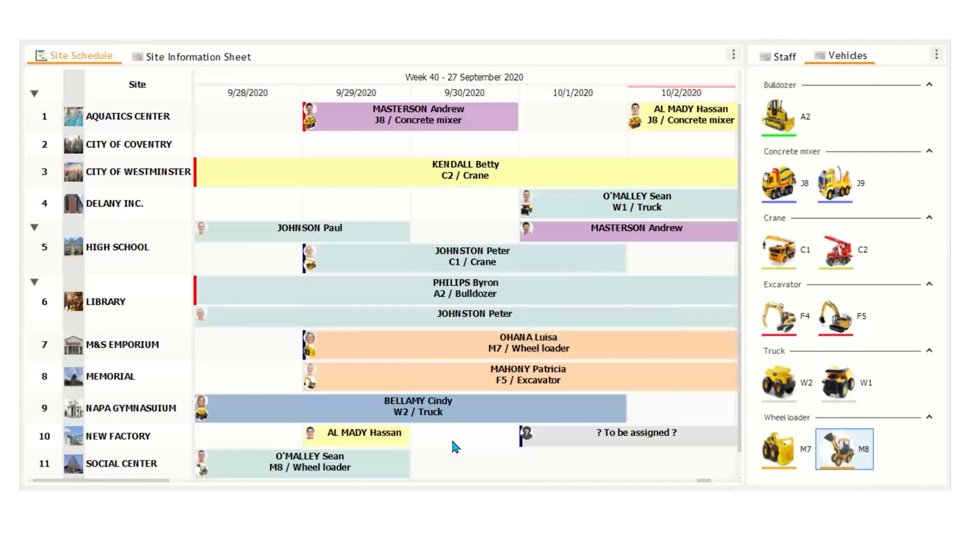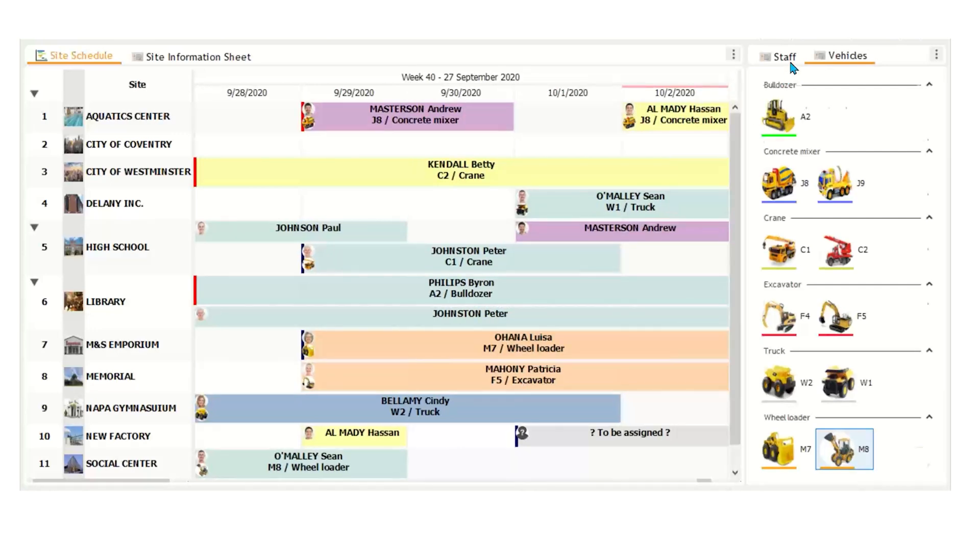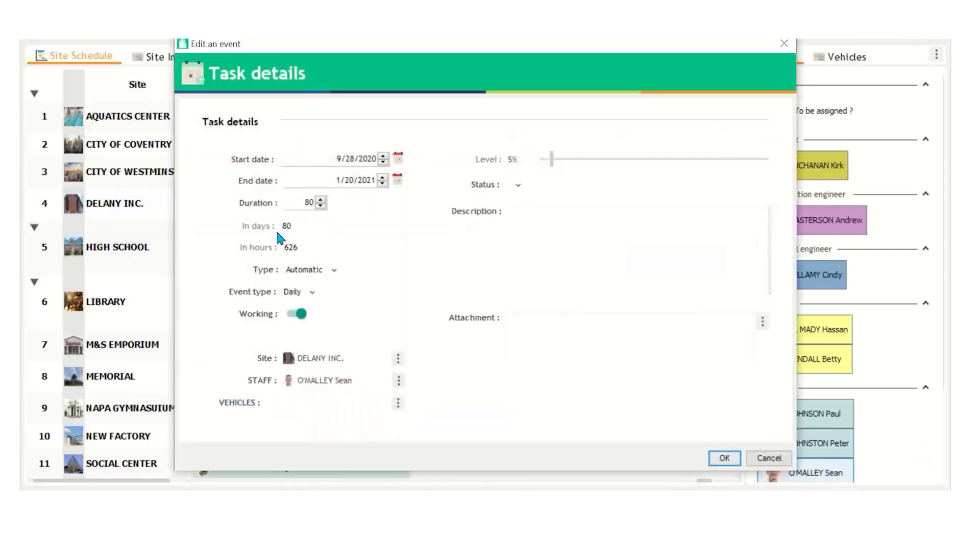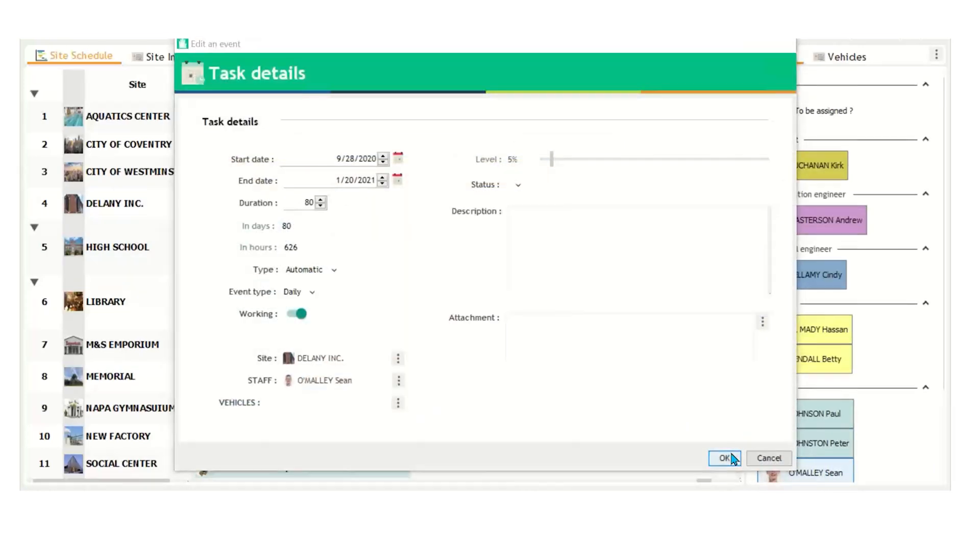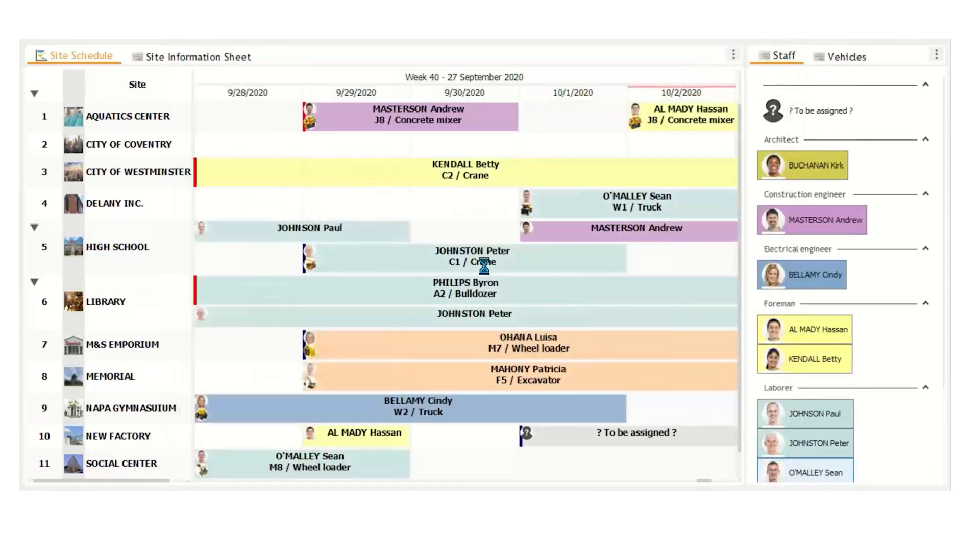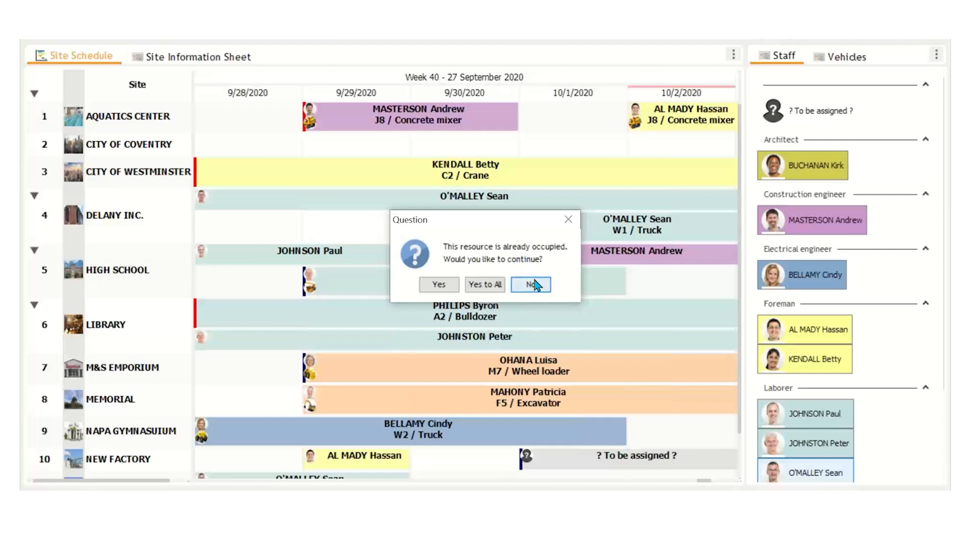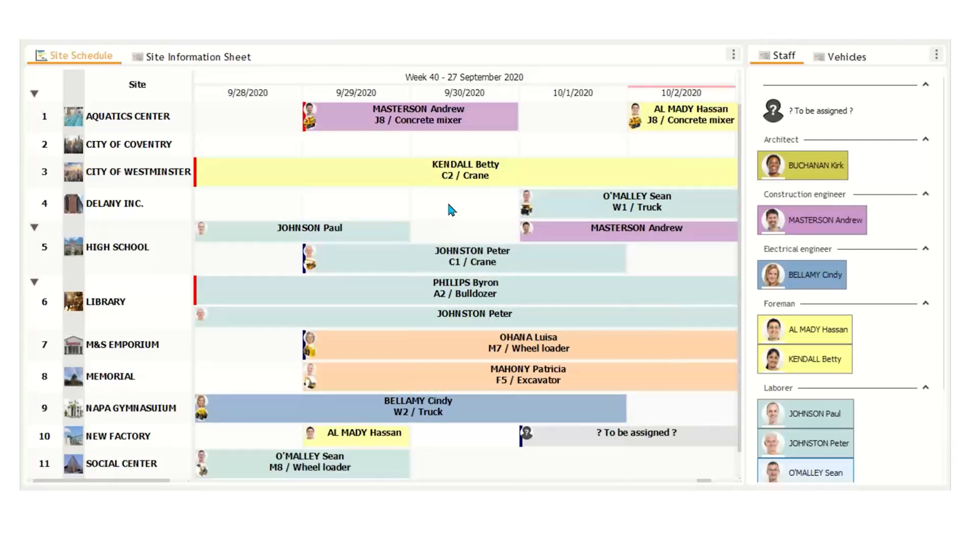Again, this is a great way to make sure that you're not over utilizing or under utilizing any of your resources. Now, let me double book an employee. Let's say we're going to schedule Sean again for another day. You'll see here, this resource is already occupied. Would you like to continue? Because we just scheduled him down here. If you press no, it'll come off the schedule. These warnings are a great way to make sure that you're not double booking any of your resources and making sure everything is on track.